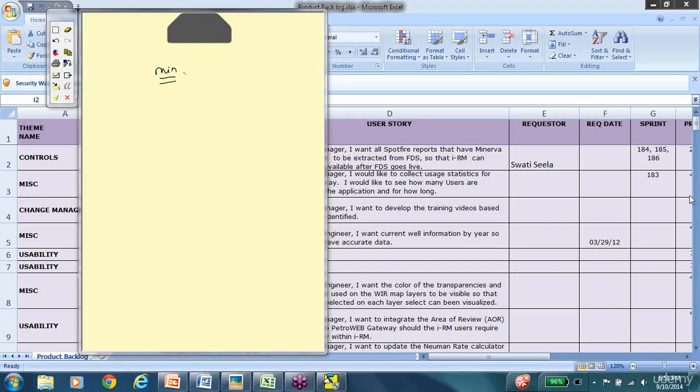I see some very valid questions here, so let me take that at the end. So Patricia's question was, what happens if a new idea comes up at the end? They can just add it to the backlog, reprioritize, and pick it up in the next sprint. So it will just be a slight lag there. Once the source code is combined, the QA tests again, maybe or may not be, depending on the processes that they have in the organization established. There will be a little amount of testing, definitely. Smoke testing will definitely happen. Sanity testing will definitely happen. But in-depth testing of the features may be or may not be, depending on time again. How is testing done in Agile? That is exactly what we are going to come next. And what about the quality of the product?